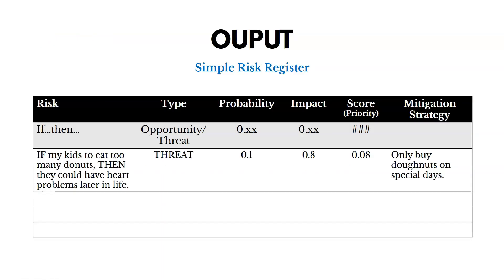The key output of Identify Risks is the risk register. It includes the risk, the type of risk — whether it's an opportunity or a threat — the probability (likelihood of it impacting us), the impact (how bad it would be if it does occur), a score, and potentially a mitigation strategy.